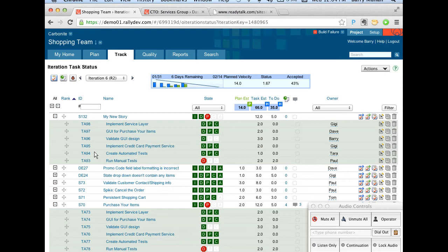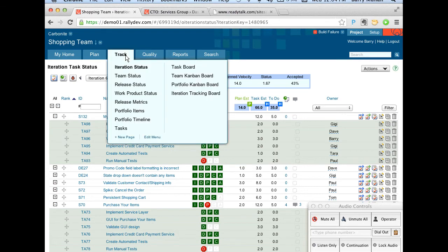If the same person is going to do that same task every time, you could actually define the ownership up front. You could even define the estimate, so this should take about 3 hours or 2 hours. If you do that in the template, the copy will get those values, and they'll be stashed and ready to go.